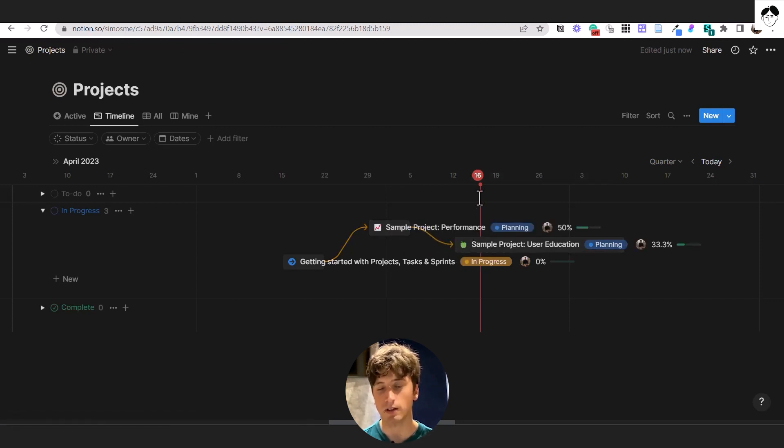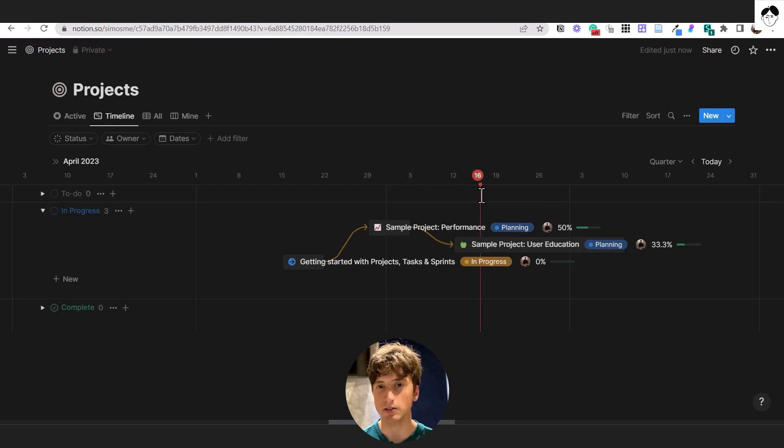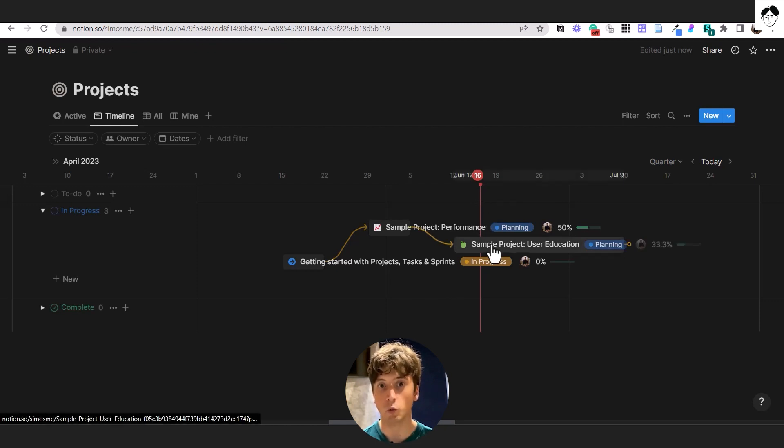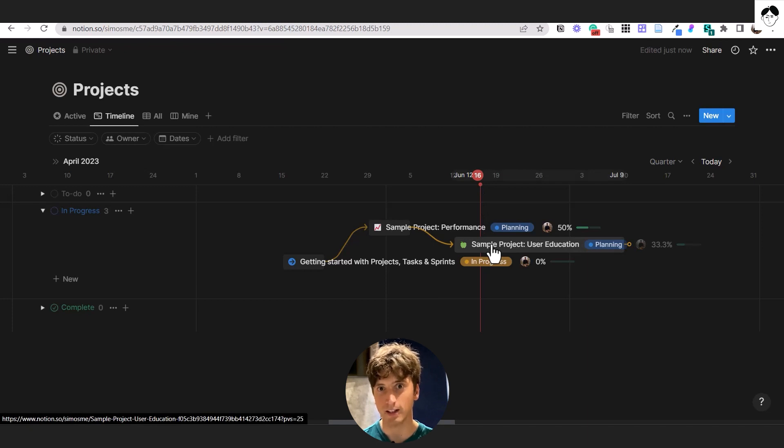However, that is only a visual representation of the dependency. There is nothing really stopping users in Notion from working on this project or editing any properties or the page content.